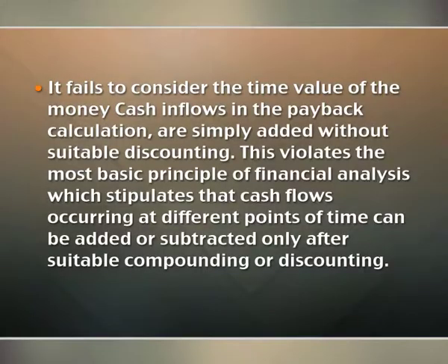The limitations of the payback criterion, however, are very serious. It fails to consider the time value of money. Cash inflows in the payback calculations are simply added without suitable discounting. This violates the most basic principle of financial analysis, which stipulates that cash flows occurring at different points of time can be added or subtracted only after suitable compounding or discounting.